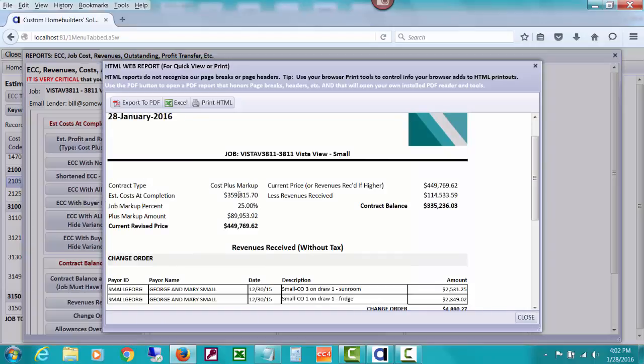So what it does is go get the estimated cost at completion. Like I say, that can be the accurate costs at the end of the job if you check mark all the actual costs as done. If they're not quite all in and you know something, you might force the ECC for a certain cost to be a certain amount.